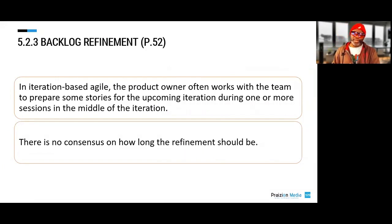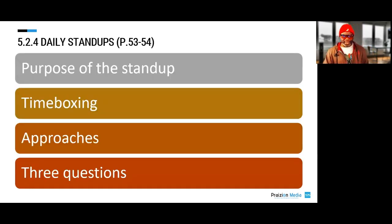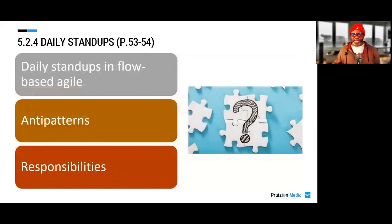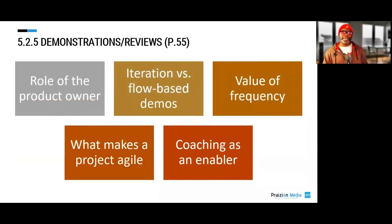In iteration-based Agile, the product owner often works with the team to prepare stories for the upcoming iteration. The guide also covers daily stand-ups, which are really for syncing up — not for giving status; we call giving status an anti-pattern. We also hear talk about demos or reviews, and it's the role of the product owner to know who to invite to these meetings.